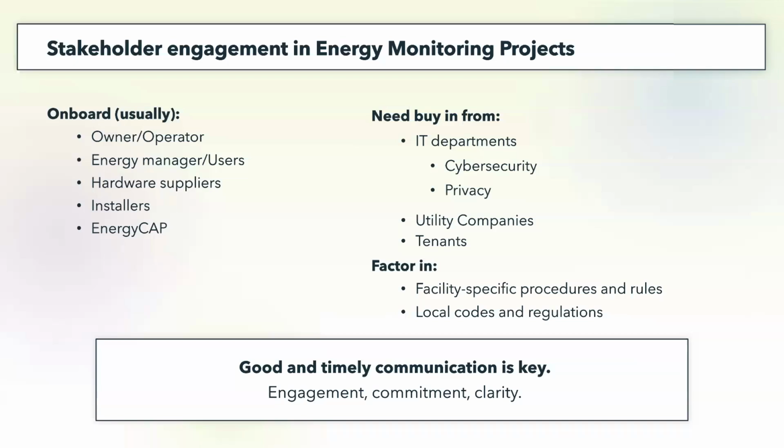So IT, we already talked about them, but part of your project might also be interfacing with a utility meter or getting access to a cabinet where a utility meter is, right? So that might involve dealing with a utility company, which are usually slow to respond and difficult to deal with. So you want to get that going as soon as possible, right? If this is a tenant occupied building, you also want to get those tenants informed about what you're doing, what you're trying to achieve, how it might be beneficial for them, et cetera. So these people are helping instead of becoming a block for your project, right?